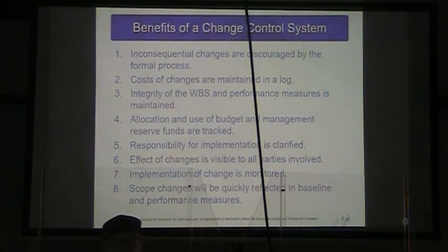Again, we want a transparent project management process. Our implementation of the change has to be monitored and its effects recorded. All of this has to go into the change monitoring log and into the reports that are being sent to higher ups.